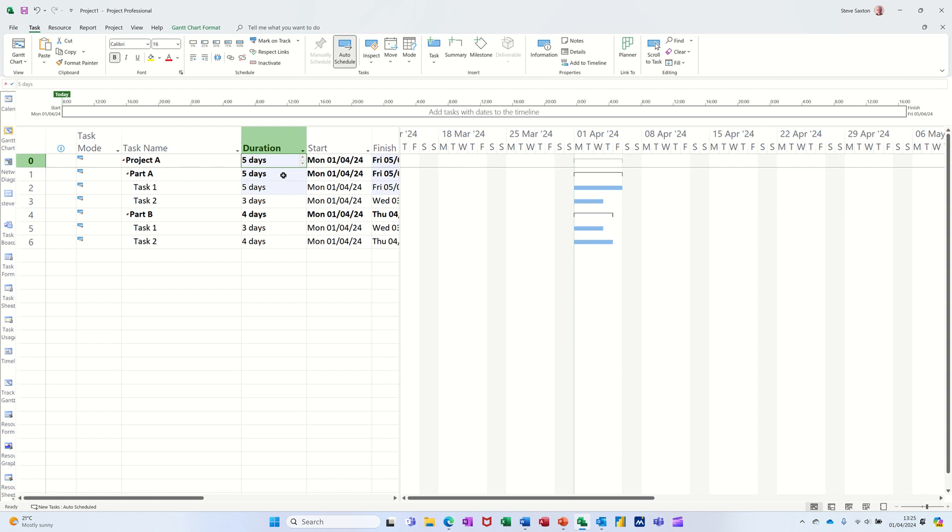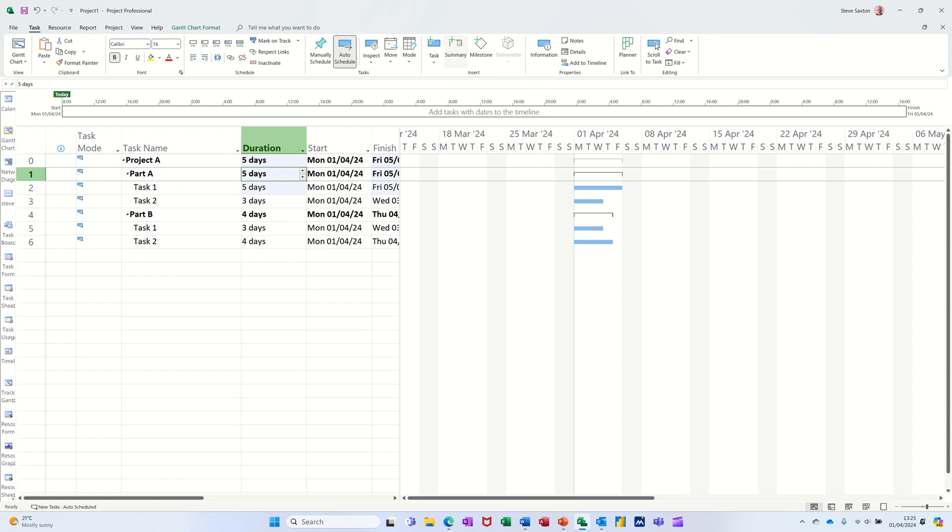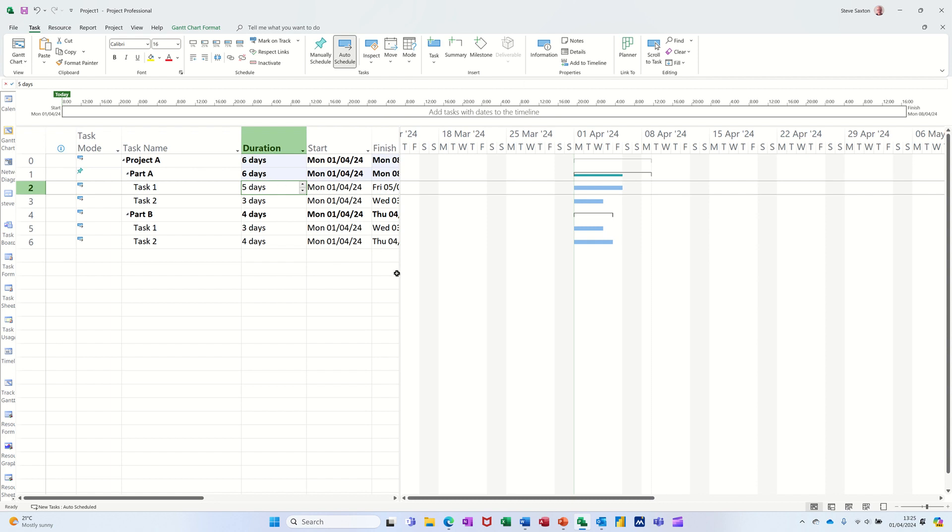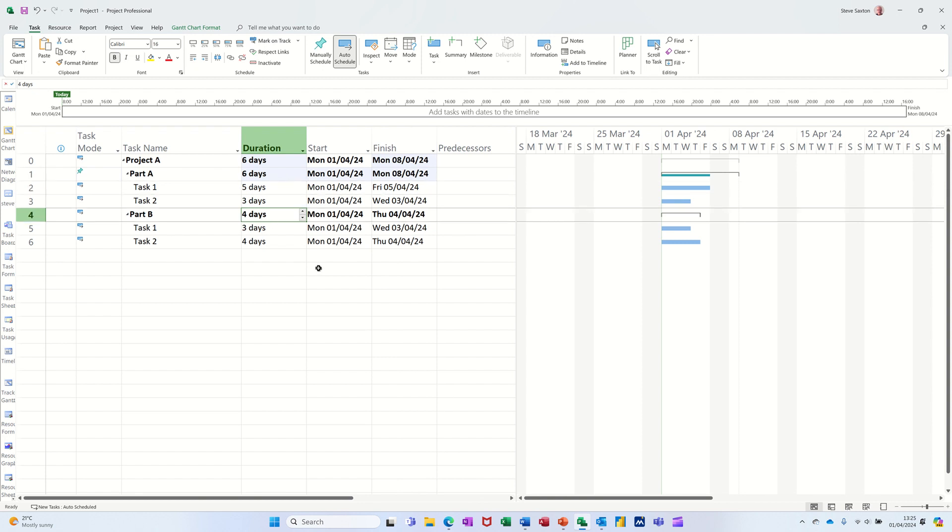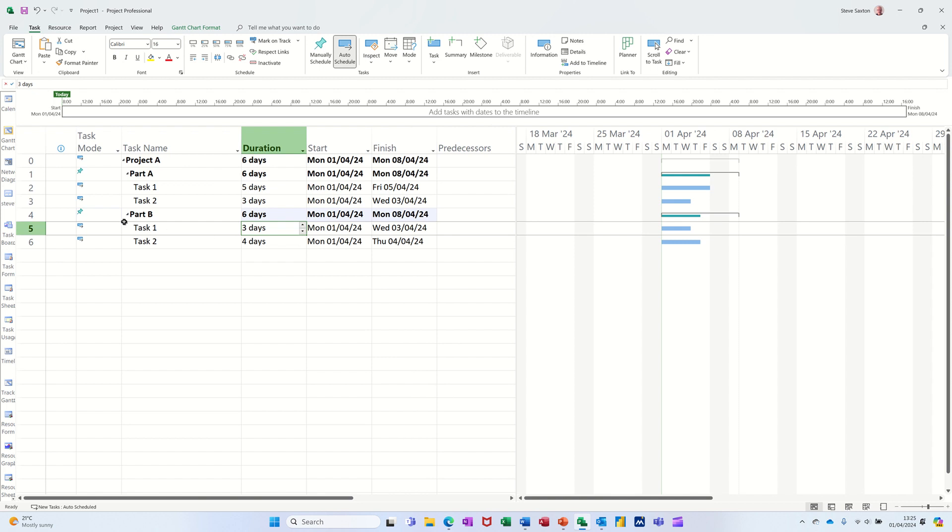Now if I click on this one, and remember this one was where I came from the task tab and this area summary, I'm going to type six there and it does let me do that. But when I do do that now, this is not picking up the correct amount of duration underneath and it's immediately changed that to a manually scheduled task because I've intervened. I've actually changed something there. The one that I did by using the indent, I click on that one and put six on there, six days, you get the same sort of thing happening. This changes to a manual task.